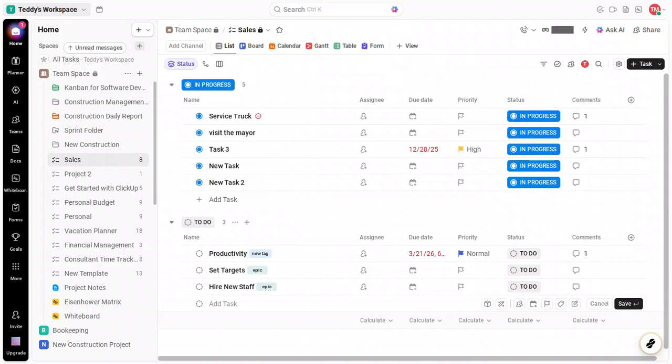Here's a helpful approach used by many teams. Treat epics as tags that group related work. In other words, creating epics in this setup is essentially another way of creating and applying tags so you can filter and report easily. In the task details, add a tag named epic. If this is your first time, you'll be prompted to create it, confirm, and save.